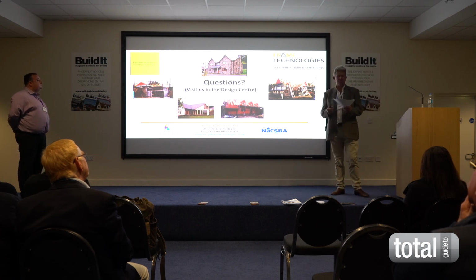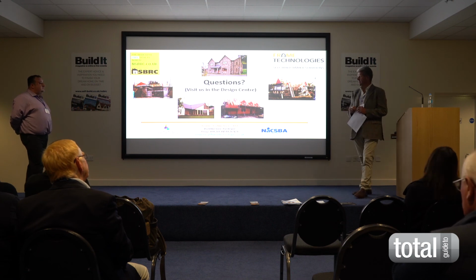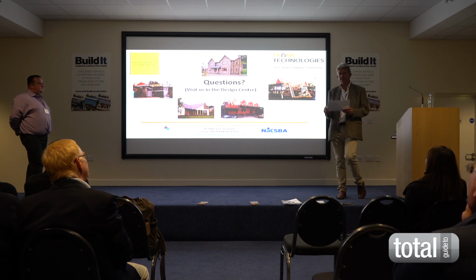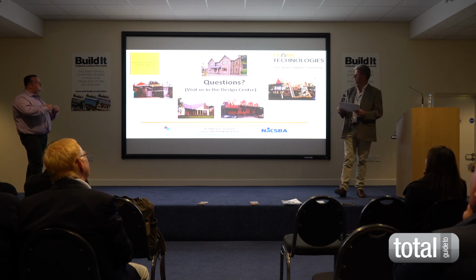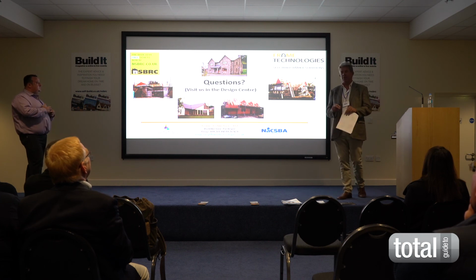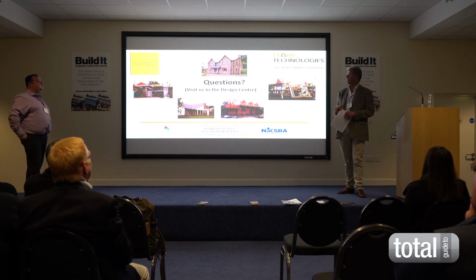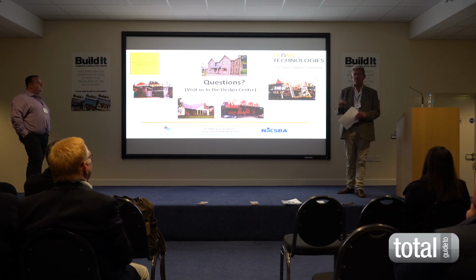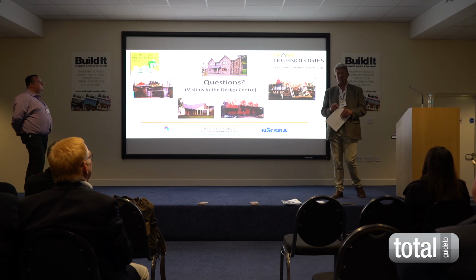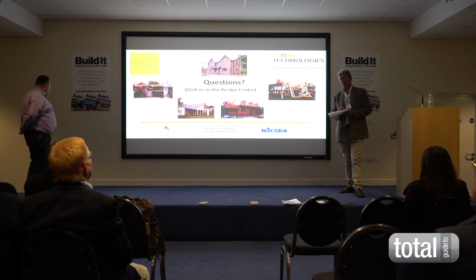Some of you read the programme for here today, and they got slightly confused in the heading for our presentation today with the Henhouse project. They'd actually got mixed up with another project we were doing up in Sheffield, unfortunately. And on that project, they said timber frame wasn't it for the project. Why? There's no room on site, access is very poor, it's very restrictive. The groundworks took 14 weeks on site. Timber frame took 8 days.